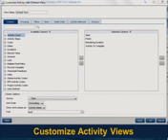So I know like the TIA program is a big program that's going to be coming on with DOT, right? So if they have a series of codes that are specifically related to TIA projects, but that nobody else in GDOT cares about, they could create codes at that EPS level that are then only available to the projects within that EPS node. And then the third level of activity codes would be the project-specific activity code, which would be where you want to create a code or an attribute that you assign to activities only within that one project.